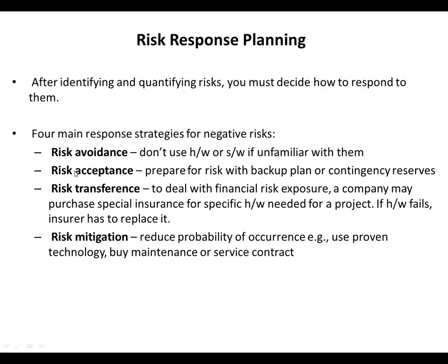And risk transference is to deal with financial risk exposure. A company may purchase special insurance, like we transfer the risk to the other company. Like when you're driving a vehicle, accidents would happen, and the damage needs to be covered by some amount of money. What you do is you give that responsibility to an insurance company. There are companies that would take that risk.